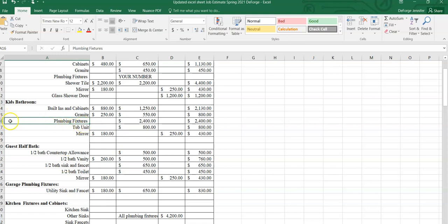And when I started my construction company, I went to the plumbing supply house myself, and I chose a little bit higher than what they called contractor grade plumbing fixtures. That way my clients would have a more realistic cost in their contract, and when they went to that supply house, they weren't going to be surprised by getting this $90 kitchen faucet. The faucet that I chose was more in the $190 range. So they had a little bit of flexibility. They could go down to that cheaper one, but they could also choose one that more met their allowance within the contract.